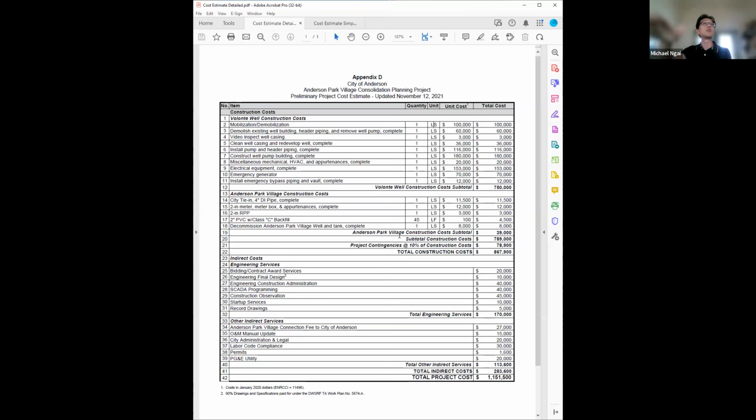So I asked the system to cut this apart. I have two separate costs: the costs up here pertain to the city, and the costs down here would be the costs that are going to be installed in or on private ground, because we have other items that we would need to look at if these projects are on private property, or have any other easement issue.